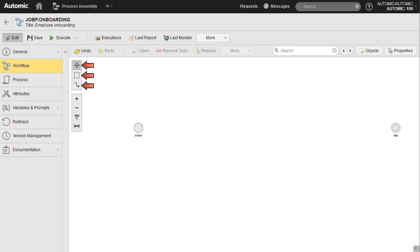The bottom floating bar contains four functions. From top to bottom, they are zoom in, zoom out, percentage-based zoom, and fit for display. Notice the default start and end dummy jobs. They set the absolute starting and ending point for your workflow. Save for rare circumstances where tasks are not connected, any defined sequence generally fits inside of and is connected to these two objects.